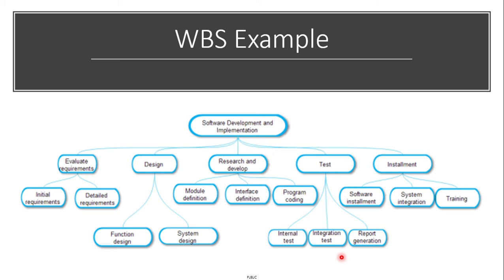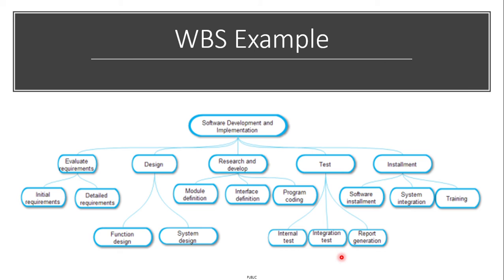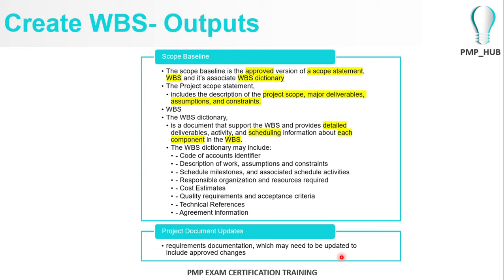Right. So the concept of scope baseline pops up from here. We had the scope statement where the overall scope is there. Now you divide it into more manageable components, and in a structure like this, you might not have the luxury of putting all the necessary detailing into the structure. So once you do a structure like this, we number it, something like this.